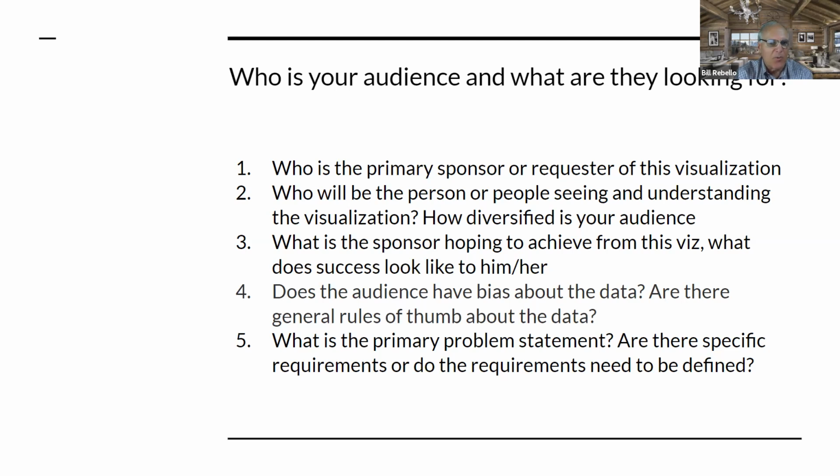Yeah, that's so important. I think that one we discovered about maybe halfway through, because I think we were all under the same assumption that the clients were internal or URI people analyzing the data. But that's a good one. I think you have to clearly understand that really early. I think that's something we learned from that project for sure. Yeah, definitely. There's a big difference between the sponsor, someone who's requesting you to make this visualization, and the people actually consuming the information on your dashboard.